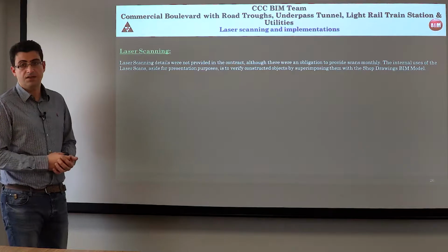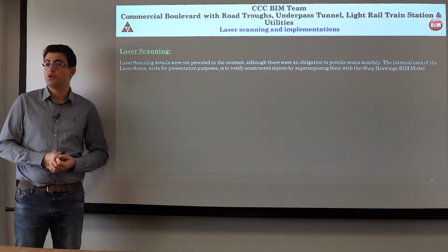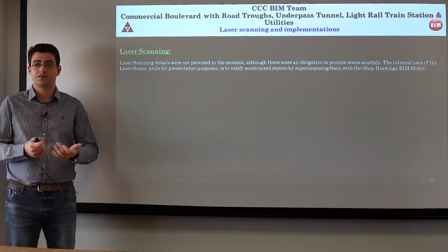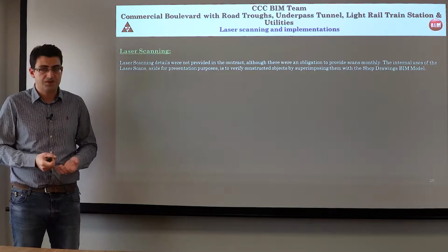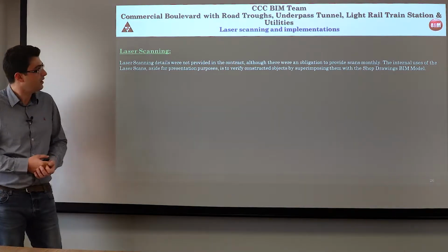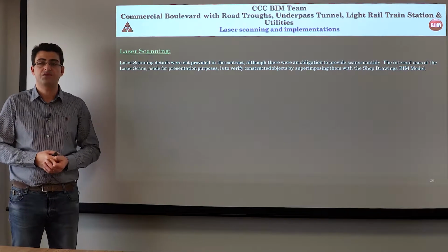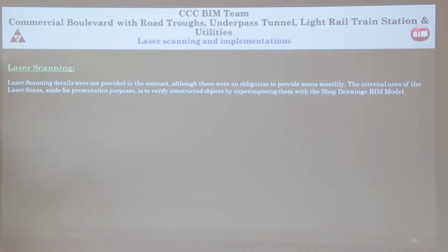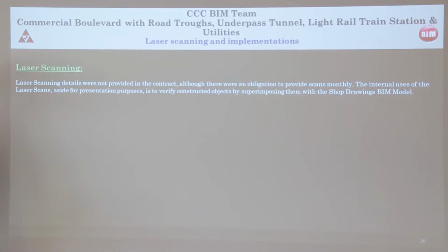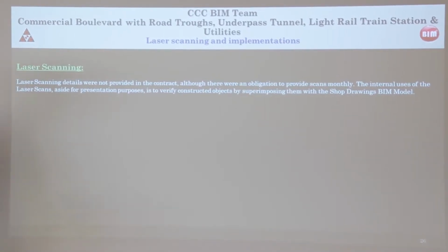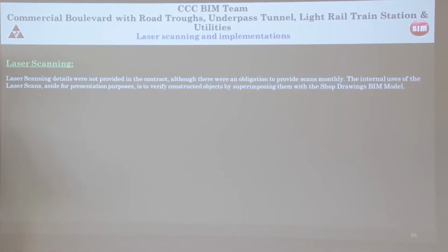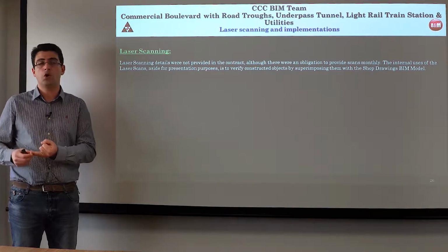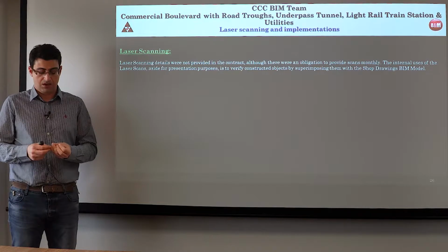Moving on and leaving the data and modeling behind, after all this has been completed, we reach the final stage, which is the as-built phase. In the as-built phase, we have to implement two different checks in order to verify that what we have done is correct as per our drawings, and that what we provide our client will be useful in order to operate this element, this project.